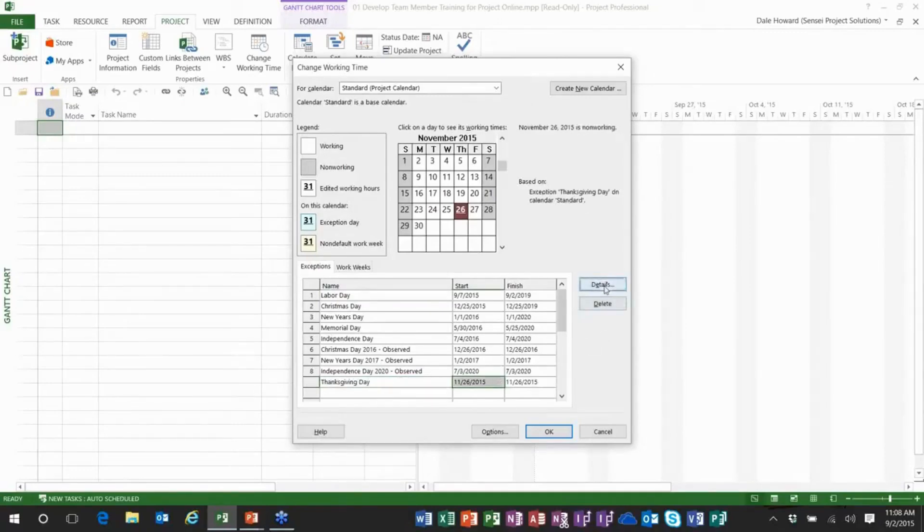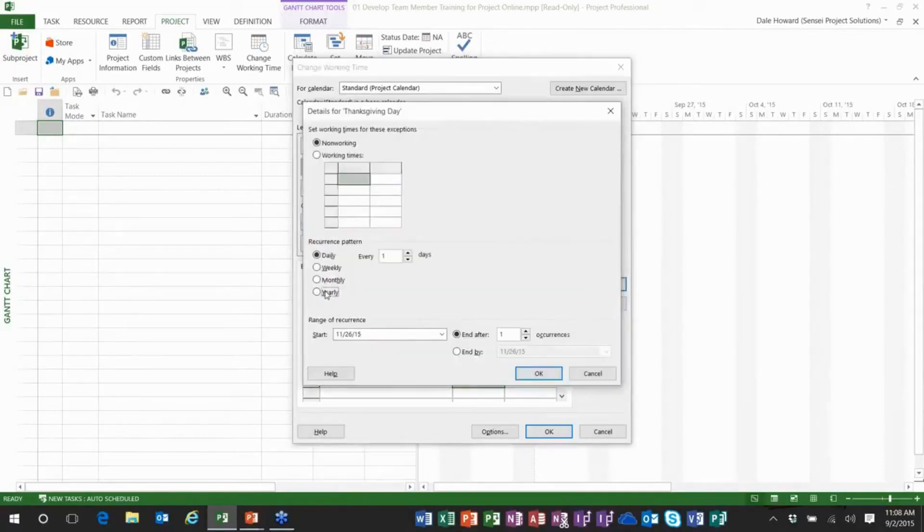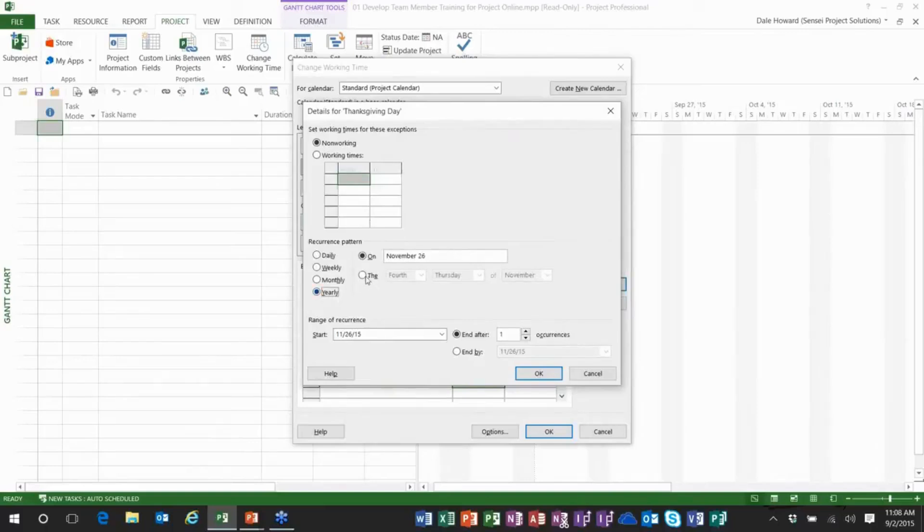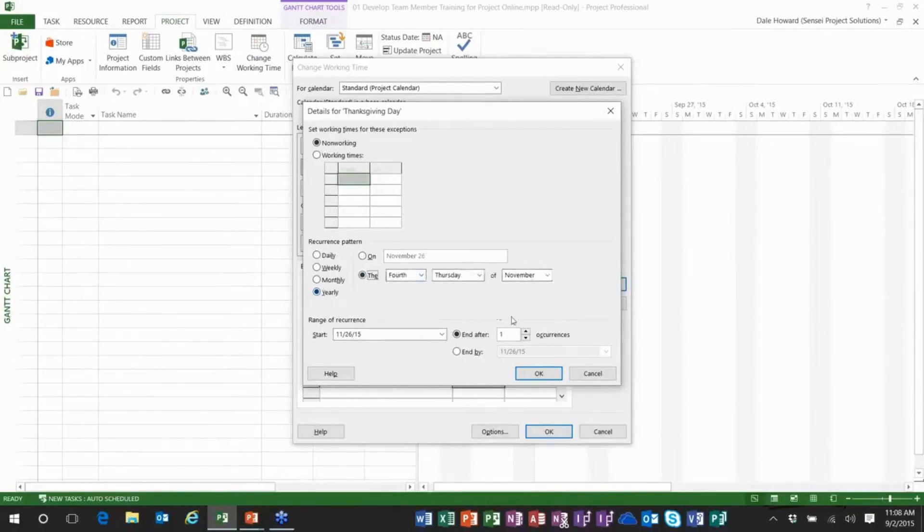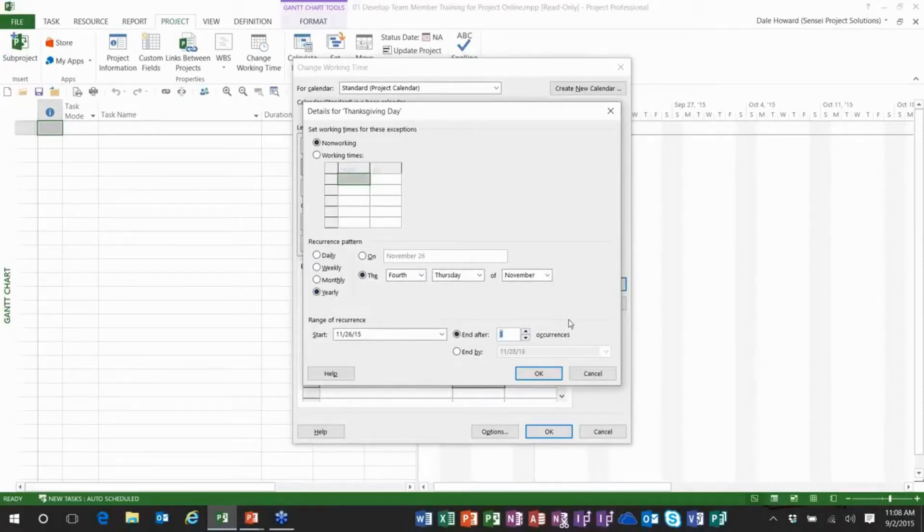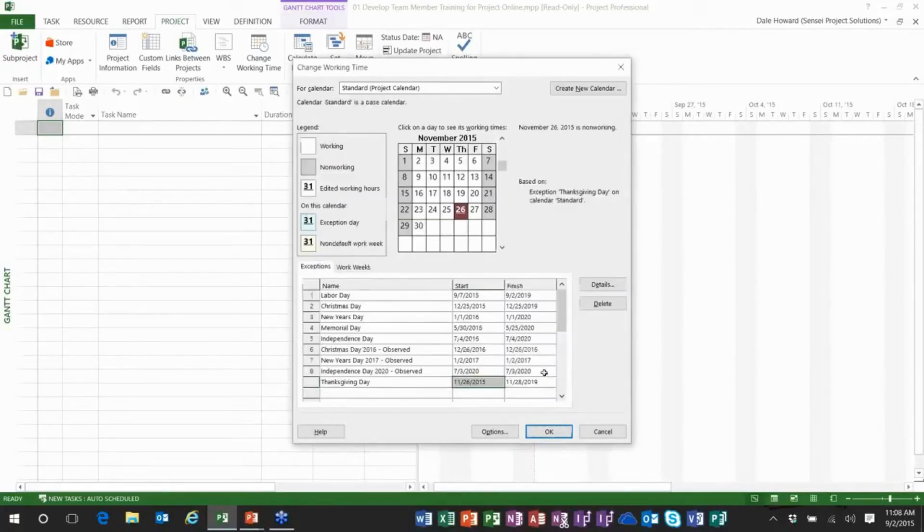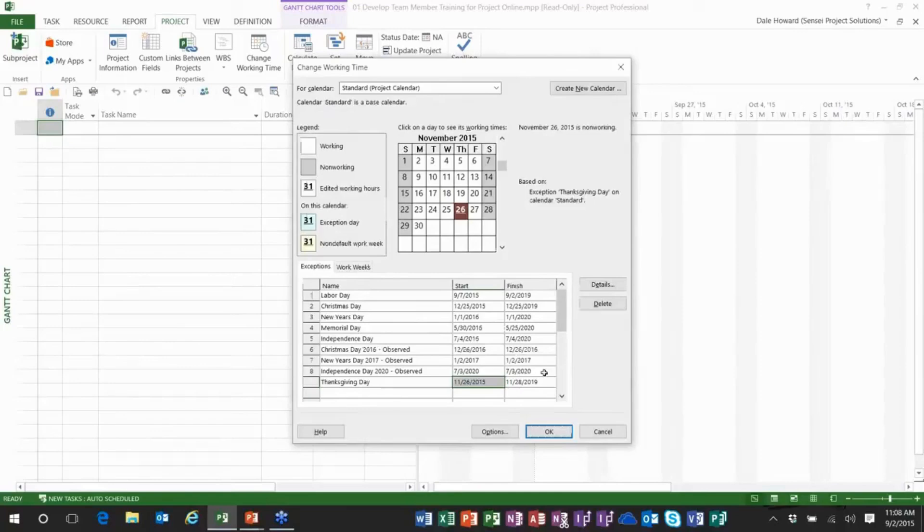Then I'll click the Details tab, come over here and say let's make this a yearly recurring holiday, and it's going to occur the fourth Thursday of November every year. And then here's where I recommended that you can make five holidays. You can make more than that if you want, but I personally like to do five, so I'll go ahead and click OK. And bingo, I just created five Thanksgiving Day observances that can be used to schedule my projects.